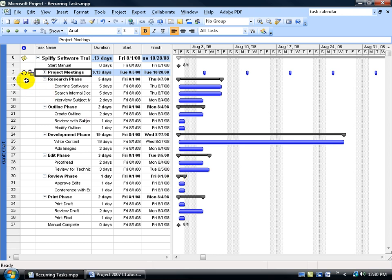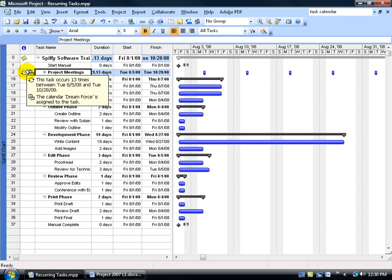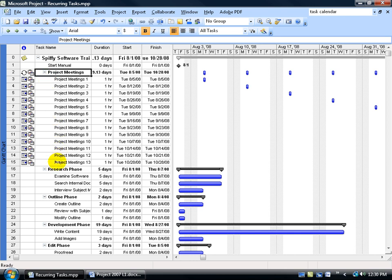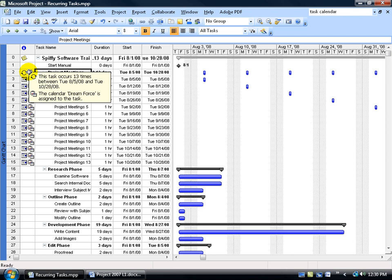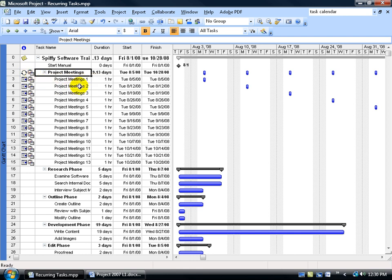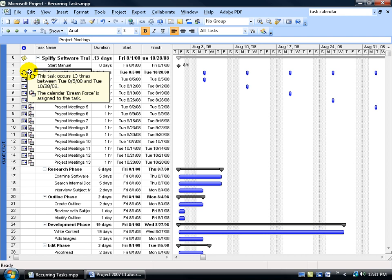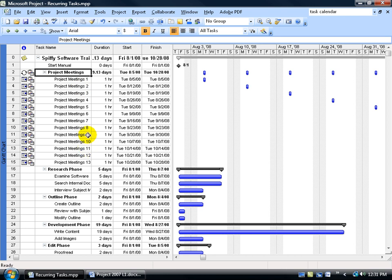After clicking OK, look at the task table. The first icon shows arrows going around — that's the recurring task indicator. Hovering over it tells you it occurs 13 times. Click the plus sign to expand and see all 13 meetings, occurring every Tuesday through October 28th. You'll also see a small calendar icon indicating that the Dreamforce calendar is assigned to this task. This is useful so that when scheduling, you can immediately see which tasks use a special calendar versus the default project calendar.